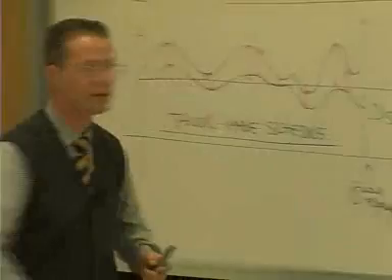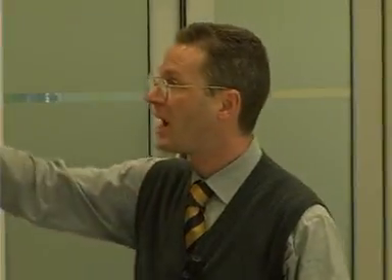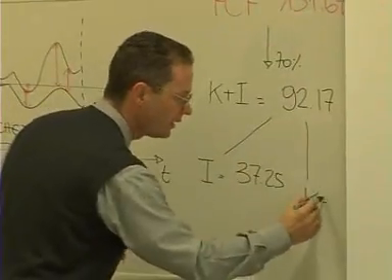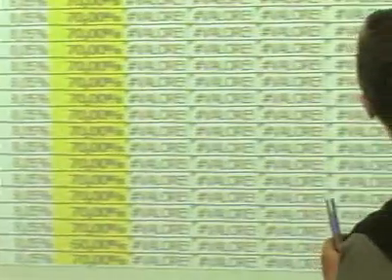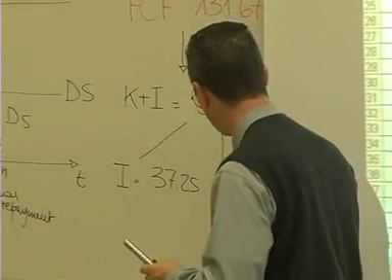Now it is quite easy to calculate the amount of principal repaid, because I know the sum of capital and interest. I know the value of interest. By difference, I can calculate the amount that is repaid. It is exactly what we did for the value-added tax facility. Okay? K is exactly the value you see under the column loan repaid, 54.92. And obviously, guys, the outstanding amount at the beginning of period number two will be the difference between 1,000 and the repaid loan, 54.92. And so 945.08. That will be the amount that we will have to use for the calculation of interest for the second semester. Quite easy. Okay? Sufficiently clear for all?